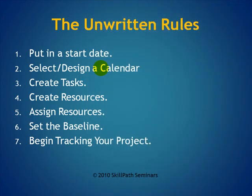The seven steps: put in a start date, select or design a calendar, create your tasks, build your resources, assign them to those tasks, set the baseline, and then begin tracking your project. In a nutshell, those are the rules for Microsoft Project.